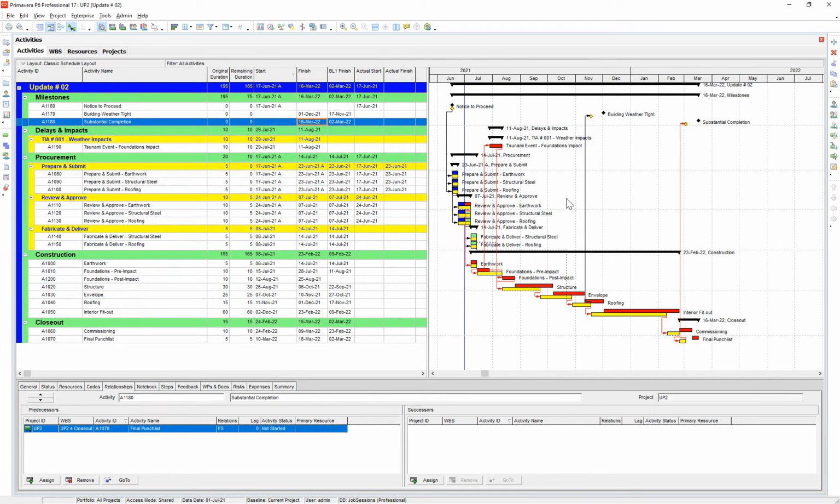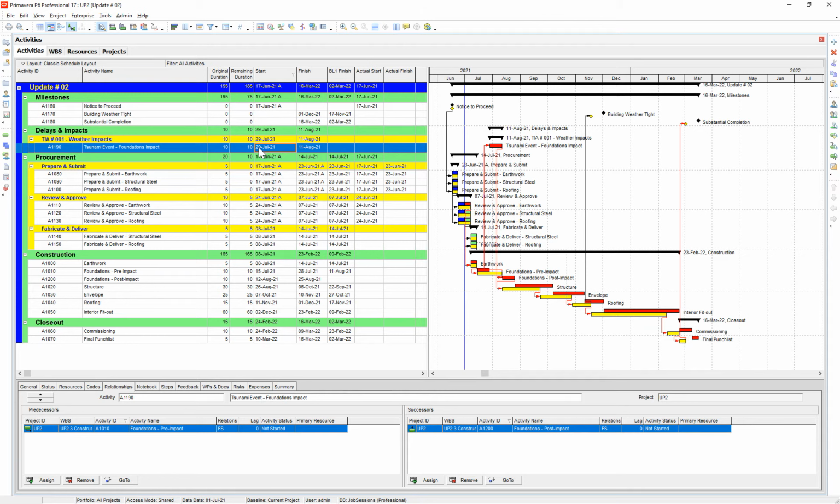So once you're at this point, the hardest part in your project is you need to figure out what's the pre-impacted schedule. So basically you have to get the approved schedule that had been submitted to the owner right before the delay event occurred. So in this case, because our delay event started on July 29th, the schedule update prior to that would have been our June update. So you wouldn't want to use a schedule file before June. You wouldn't want to use the baseline.